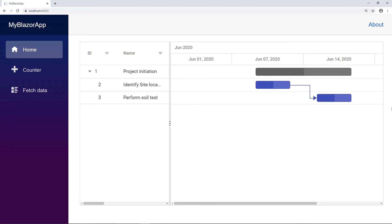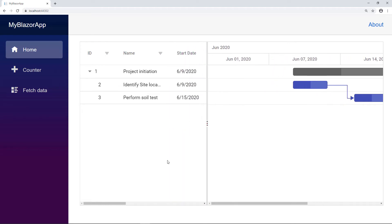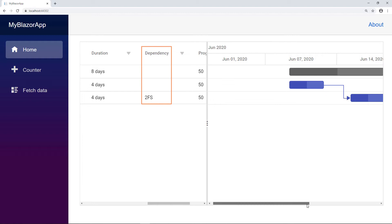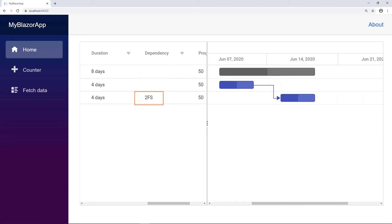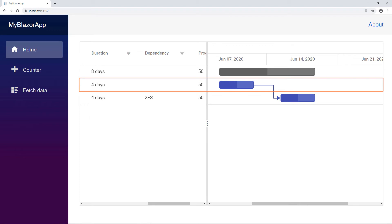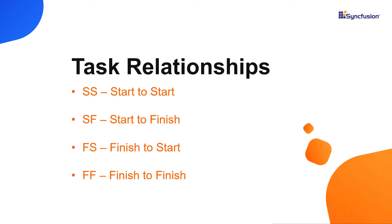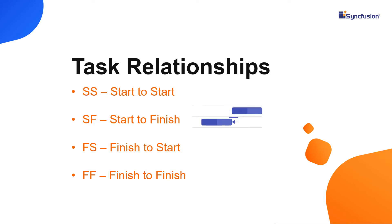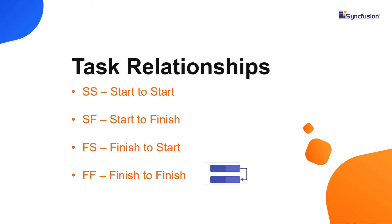You can see the Gantt chart with the task dependencies annotated as arrow marks — task 2 precedes task 3. In the tree grid, you can see the dependency column. For the third task, the dependency is added as 2FS. This means task 3 is preceded by task 2 in a finish-to-start relationship. Finish-to-start is the default task relationship. There are four types of task relationships: start-to-start, start-to-finish, finish-to-start, and finish-to-finish.